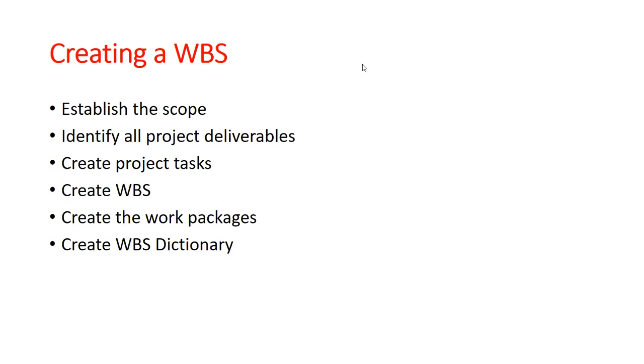Okay, you say a training project on finance management for 300 SMEs in 12 local governments, maybe in Abuja. No, Abuja doesn't have 12 local governments. The 12 local governments in Kano. That means we are not taking all the 52 local governments in Kano, we are just restricting ourselves to 12, right? So when you start seeing yourself getting to 13, you can call yourself to order and say, no, I'm exceeding the scope of the work. I'm moving beyond the boundaries of the work, all right?